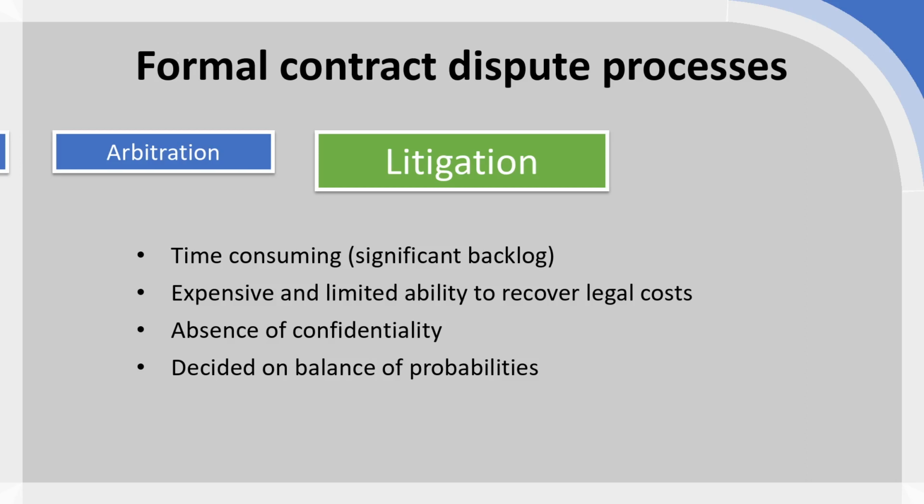Courts absolutely have the power to impose fees, to order payments. So it can be used to resolve significant major disputes with significant cost components. However, the downsides are quite major. The first would be the sheer amount of time that can be taken up by litigation actions, both in pre-trial motions and lengthy waiting periods before courts will actually hear a particular case.